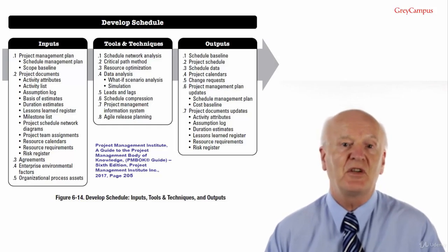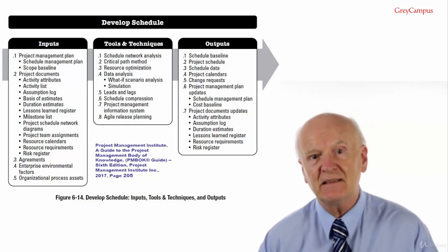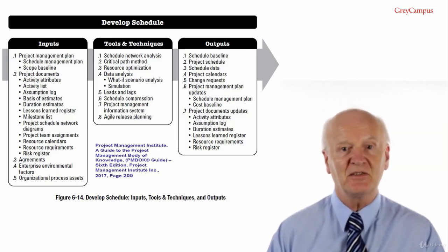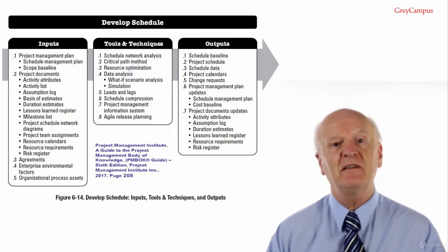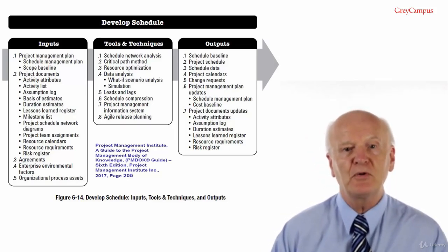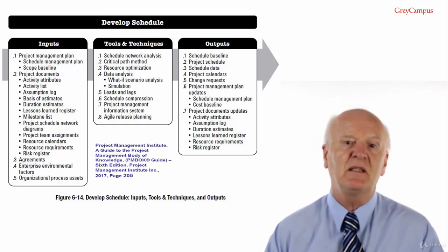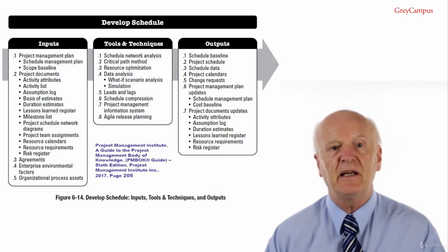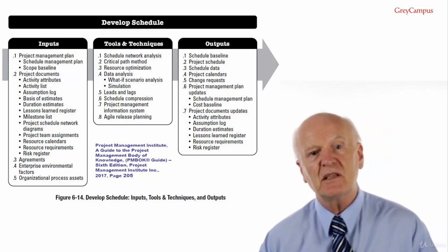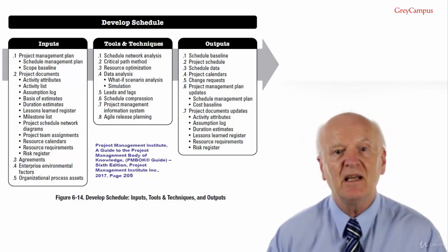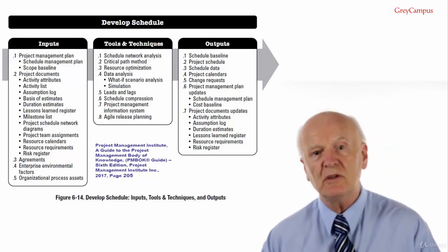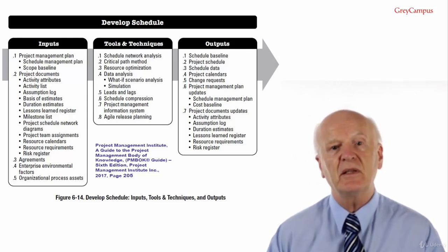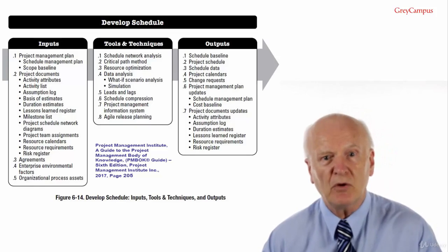I responded that changing the baseline to reflect reality was one of the most basic principles of project management. The consultant got to waving his arms around and challenged my project management knowledge and abilities, but I said that if we accept a change which adds more activities and changes the start and end dates and maybe extends the project end date, we need to be able to track against those new details rather than the old ones. It makes no sense to track against something which is now demonstrably wrong.